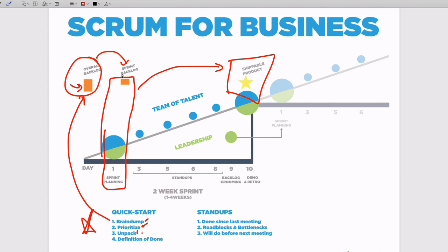And along the way, as we're defining our sprint backlog, we want to be real clear about our definition of done. So definition of done is, how do we know that it's complete, right? For example, if it's the website example, the definition of done might be that a customer could come in and find out what hours our business is open because the contact page has our appointments. Or maybe not the whole website is done, but the booking page is done to the point that a customer could actually book in for a fitness class, right?